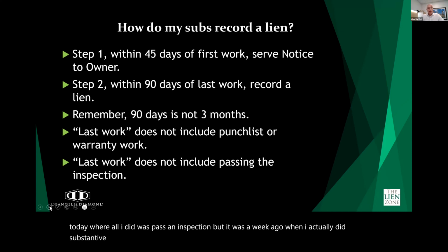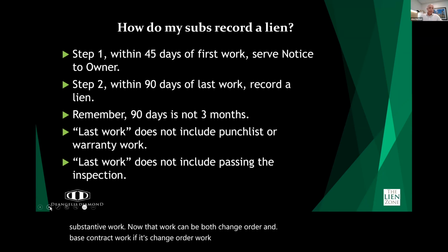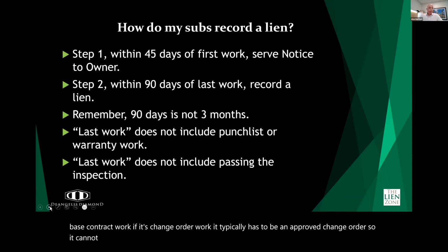Now that work can be both change order and base contract work. If it's change order work, it typically has to be an approved change order. So it cannot be just extra work that I decide to do on my own to create lien rights. It has to be work that's approved contractually.